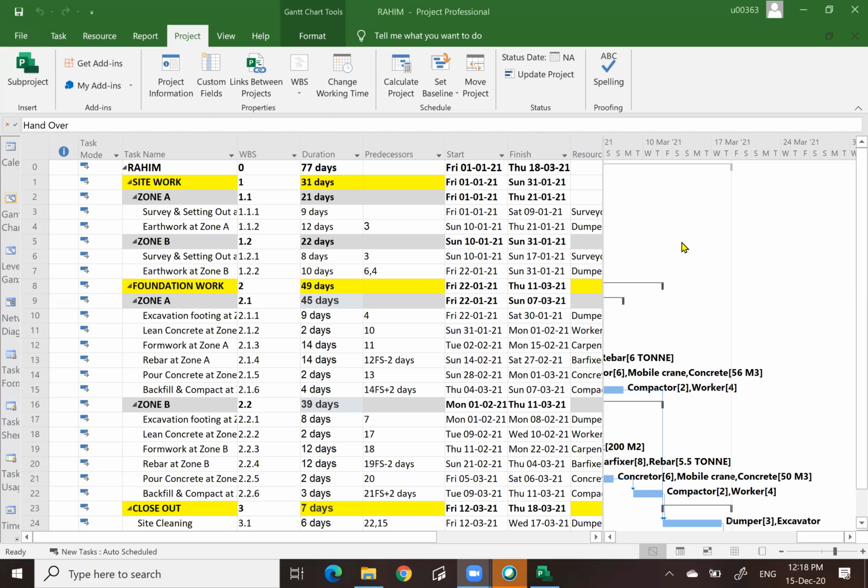Okay, you will earn 5%. If you have not done the file yet, your Microsoft Project will start on 1st January. Okay, 1st January next year. Make sure your project starts on 1st January next year. And then there are 7 working days, with no holidays in between, not even on Sunday. And then every day, 10 hours of working time, starting from 8 until 7 p.m.